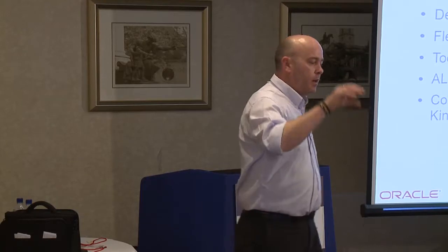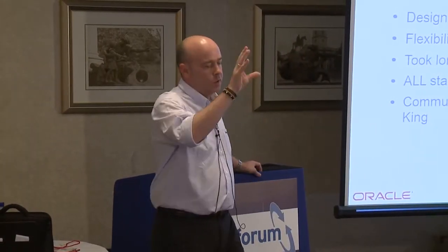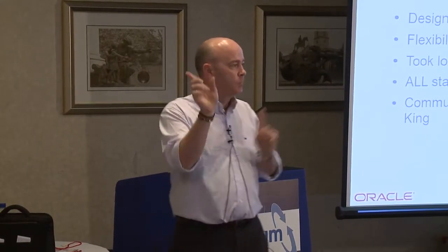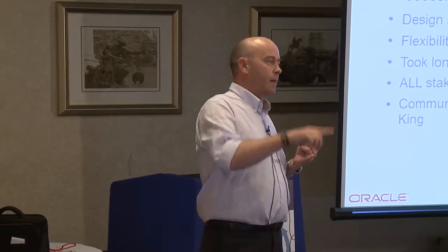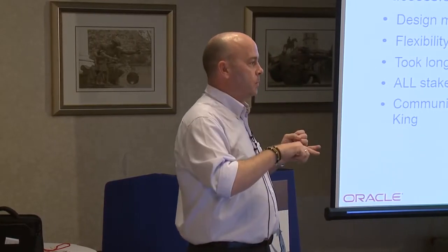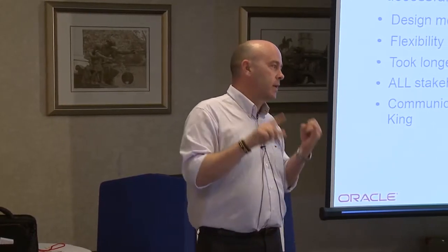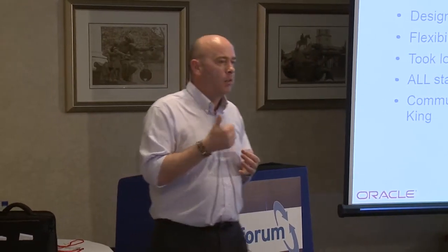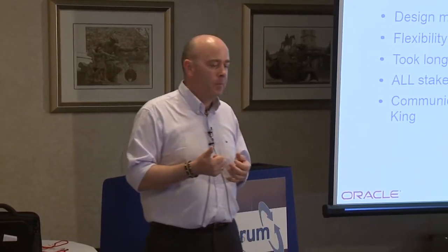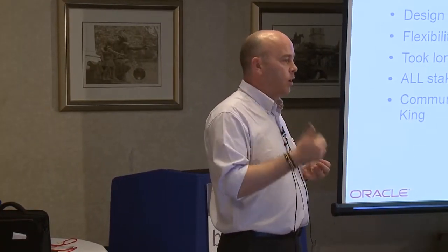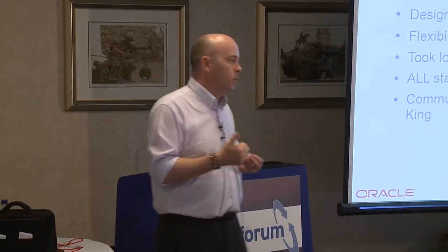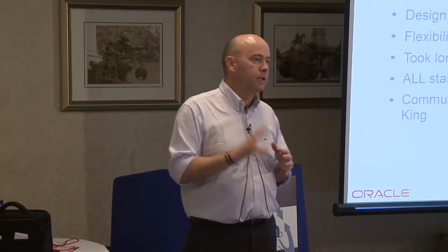Yeah, and again, this is one of the things that we're finding. People start looking at VDI and find it a fascinating subject, and it's the cool one to go and do, and then they start investigating all the peripheral costs around it. Microsoft Office licensing, Microsoft VDA licensing. Oh, my application vendor there doesn't have a licensing model that supports VDI, and then everything starts getting incredibly complicated. And I think one of the big things that's holding back VDI from being taken up on a large scale is not the cost of the technology, it's all the hoops that have got to be jumped through with Microsoft to make sure that your environment is licensed properly. And let's face it, who here thinks their entire environment is 100% squeaky clean licensed?